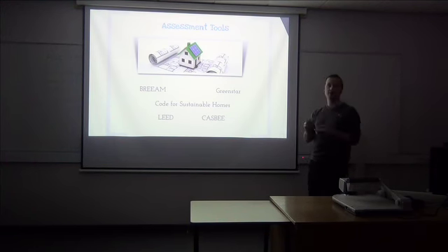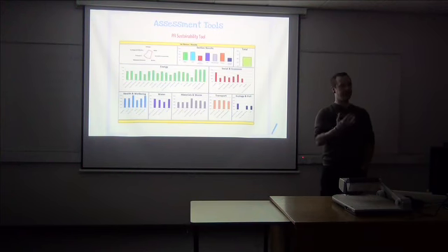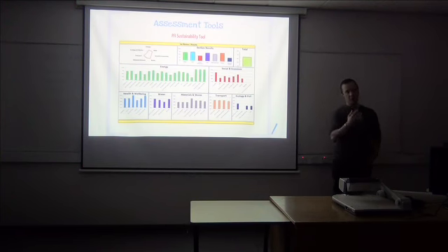We have these bespoke tools. This is one I created. It's called the PFI Sustainability Tool. It was generated to try to help us choose from 5 consortia of building design teams who were bidding for a £300 million housing project. And the client, who was a local authority, wanted to understand if they were to pick one of these groups, which one would deliver the most sustainable set of buildings. And we couldn't use the existing tools like BREEAM and Code for Sustainable Homes. They didn't apply very well to this particular method. And also the local authority wanted to make some tweaks.